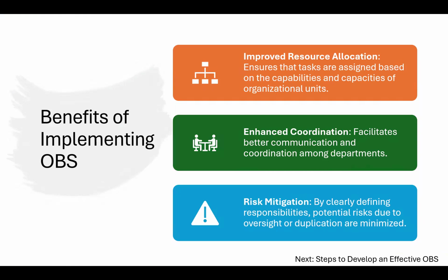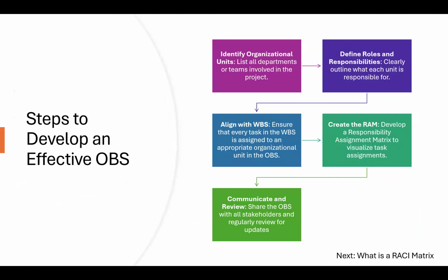Benefits of implementing an OBS. Improved resource allocation, enhanced coordination, and risk mitigation. Steps to develop an effective OBS. Identify your organizational units, define roles and responsibilities, align with the WBS, create RAM or responsibility assignment matrix, and finally, communicate and review.